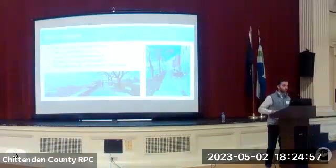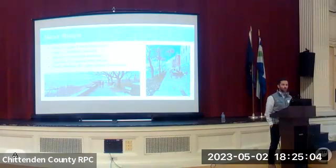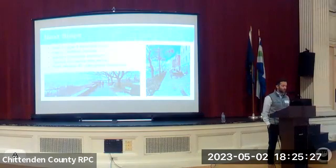So looking forward, where do we go from here? These projects are defined by what's called a purpose and need statement. Why are we doing this project, and why do we need to do this project? Based on what we hear tonight, we will formulate that statement, and that'll become the slogan for this effort going forward. From there, we'll look at analyzing different alternatives based on the feedback we get tonight, as well as general conversations and meetings among the project team and the advisory committee.